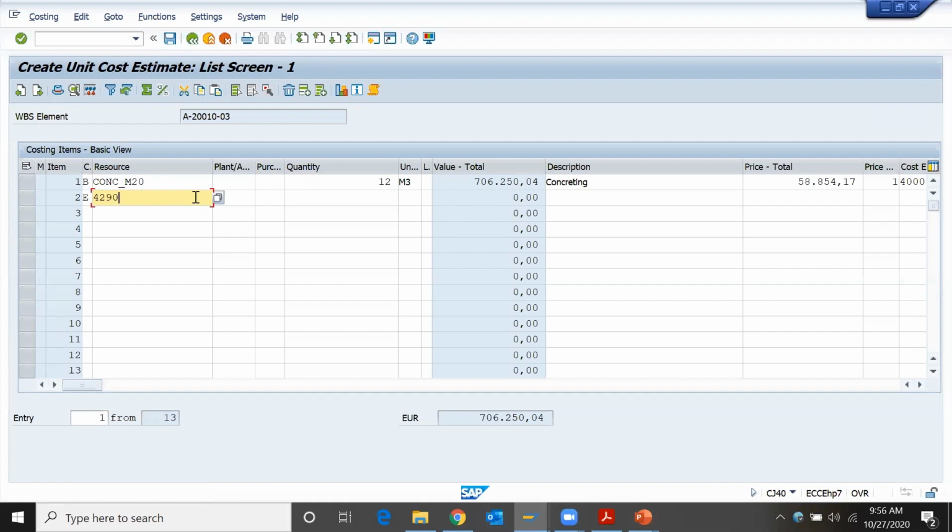Or we can give the example of painting. Painting includes some activities. Firstly, we have to finish the surface. After finishing, we have to apply primer, one coat, primer, second coat, then there will be the final coat. So n number of activities will be involved, and those activities we can capture by using these item categories, base planning object. I got it.